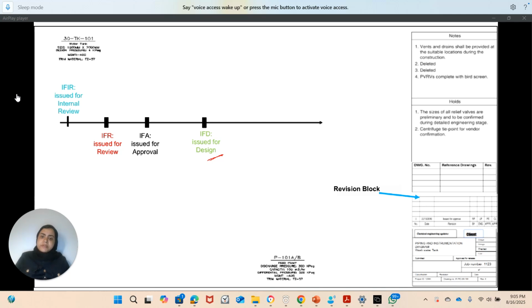So disciplines like instrumentation, mechanical, and control, those departments will look into the P&ID now, because you're saying, hey, I have done my part in terms of process equipment design. I have approved those with the client, and they said we can continue. So now, since we have approved the major elements, you can start with your design. This is why this is done in this stage.